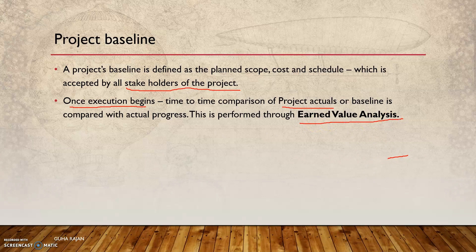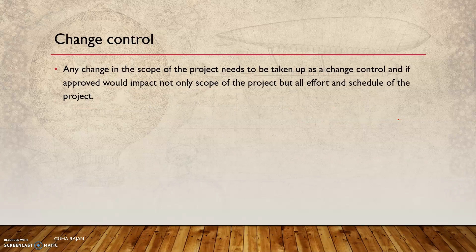Basically, you compare the planned versus the actuals, and based on that you perform some actions — that is called the earned value analysis. Another point, which is often overlooked, is that any changes in the scope of the project, however small, need to go through the change control process.